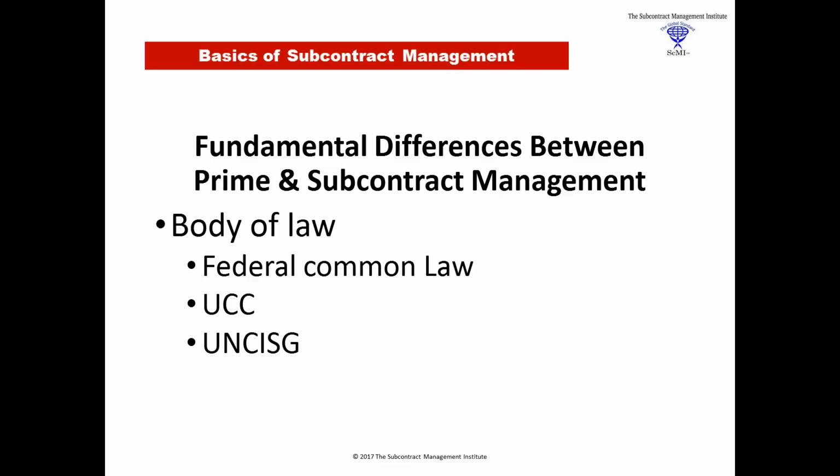And if you look at your standard form contracts, those of you in the larger companies, you will see over the past few years, they've finally started putting into their body of law or controlling law clauses that the UN Convention does not apply. Because if you don't do that, you can get trapped. And here's how. Let's say you enter into a contract with a company from France.